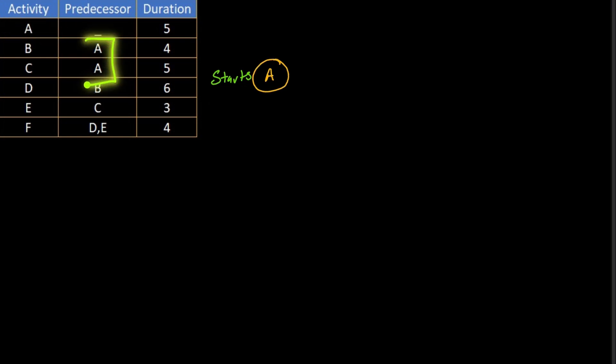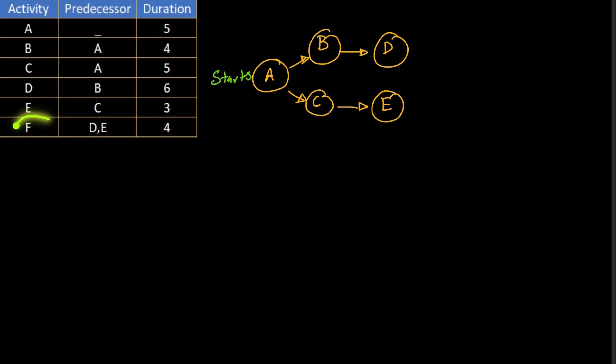After the completion of A, two other activities can start, B and C simultaneously. When B completes, D starts, and when C completes, E starts. The final activity is F which will start only after the finishing of D and E. Since F is the final activity, this makes the finishing of the project.